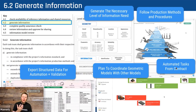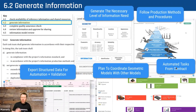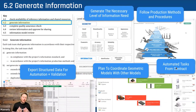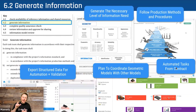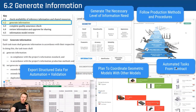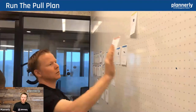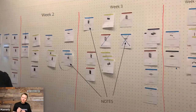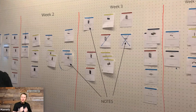The information requirements developed in a structured way can be exported for more automated validation. Inside of Plannerly you can hit export to understand the whole data structure for the tasks — who's responsible, when they should be carried out, what the geometry, documentation, information requirements are, and even which elements in the model they're linked to. Being able to run a pull planning session with cards printed out with images is a really visual and rich way to communicate what is happening and when. Many teams through lockdown printed these cards and put them on their walls to manage their own tasks.